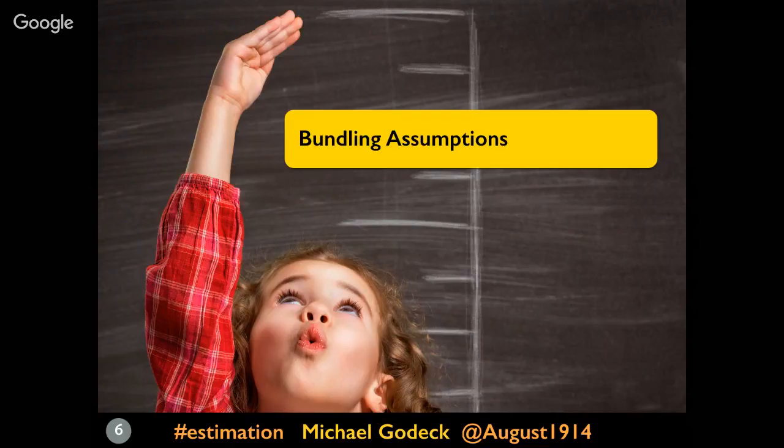We expect that after the work is done, the actual cost is going to turn out to be different from the estimate, because we know there are factors that we don't know about or can't control that are going to affect the outcome. So as we estimate, we substitute these unknown or unknowable things with assumptions about what they're going to turn out to be. For example, if we're estimating a software story that's built around an unfamiliar third-party API, we know there's going to be risk because we don't know the API, but we don't know what the risk is going to be. So we increase the size of the estimate to accommodate the unknown. The amount of the increase becomes an implicit component of the estimate, representing our assumption about the nature of the risk, right?